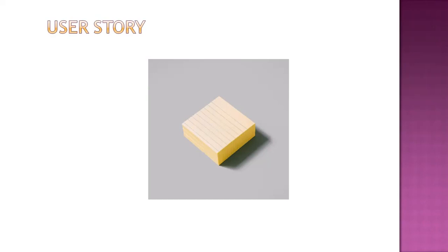So here comes the catch. Generally, we write user stories for design, we write user stories for testing, we write user stories for architecture. It is something like that. We generally write user stories, right? Which is not correct. They are tasks. They are some work, some tasks at the work stream level. Design is a work stream, testing is a work stream, development is a work stream, engineering is a work stream, architecture is a work stream. All these are work streams.